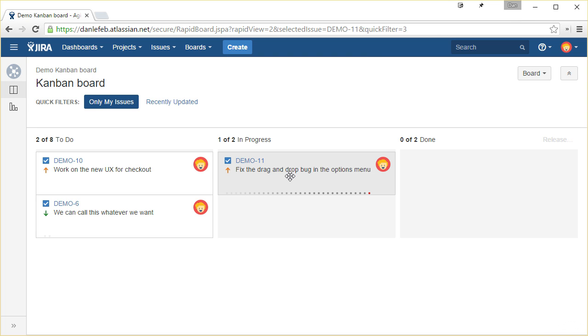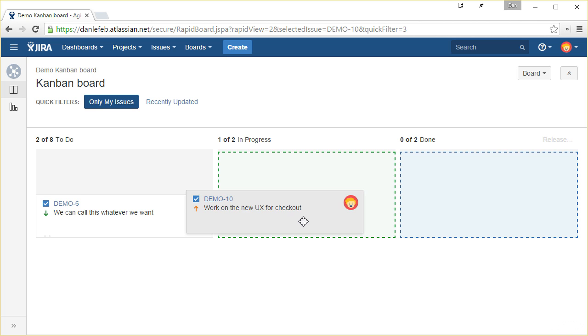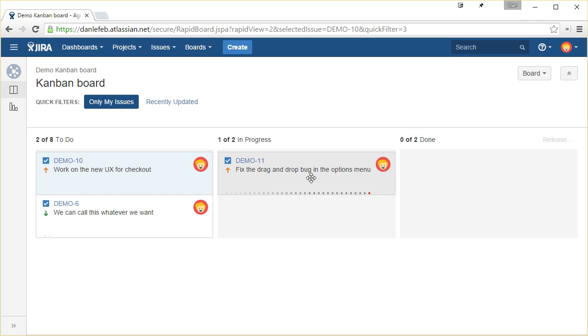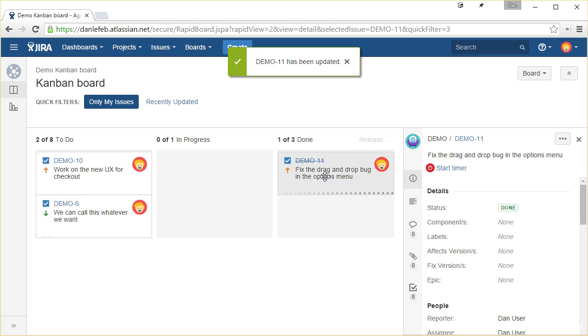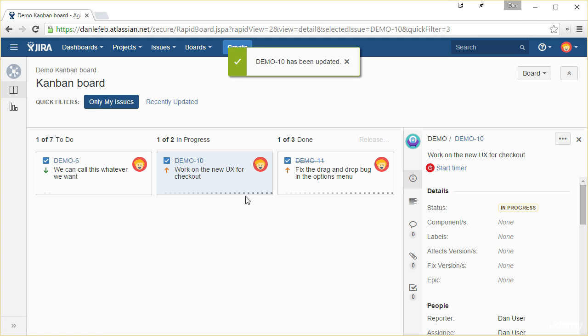Now, the idea is that, on a day-to-day workflow, you're going to keep checking back and keep this up to date, and you don't want to actually start working on something else until this one is as close to done as you can get it. Ideally, if you can completely finish it yourself, that's great. Sometimes in the real world, you actually need to get approval for something or you need to send something off. And if that's the case, you can put this on hold and then drag something else over to start working on it. But the idea is that you want to take this all the way to the right. When that's done, pull something else over and actually start working on that. So that's the basic day-to-day workflow in the Kanban board here.